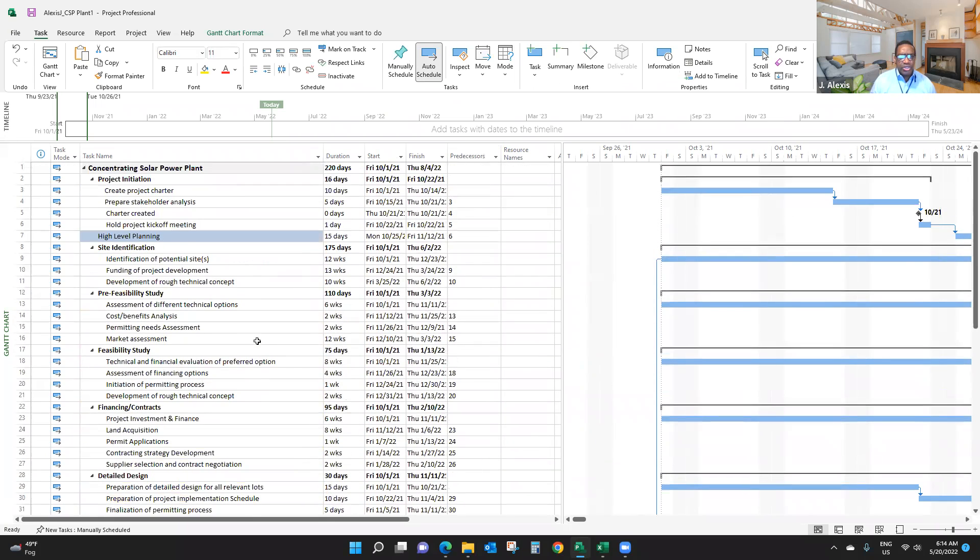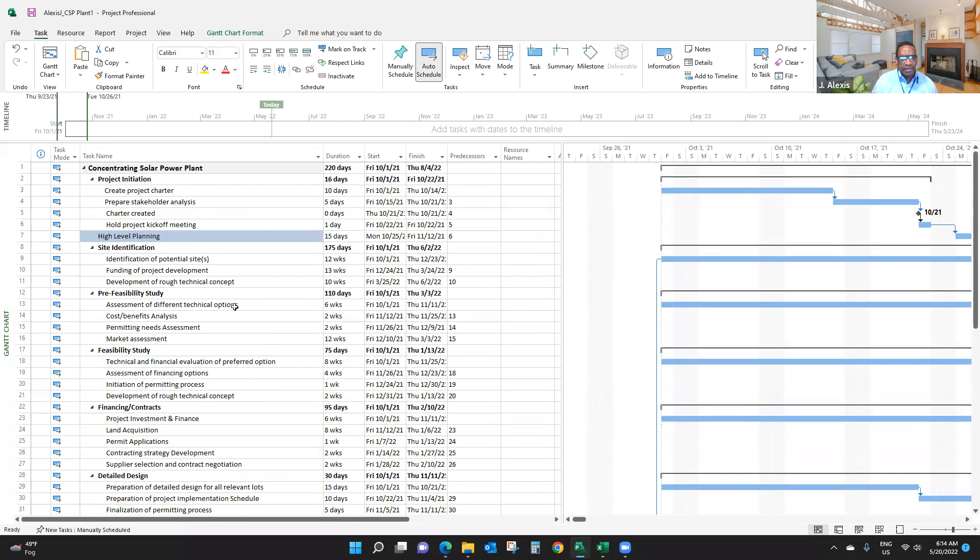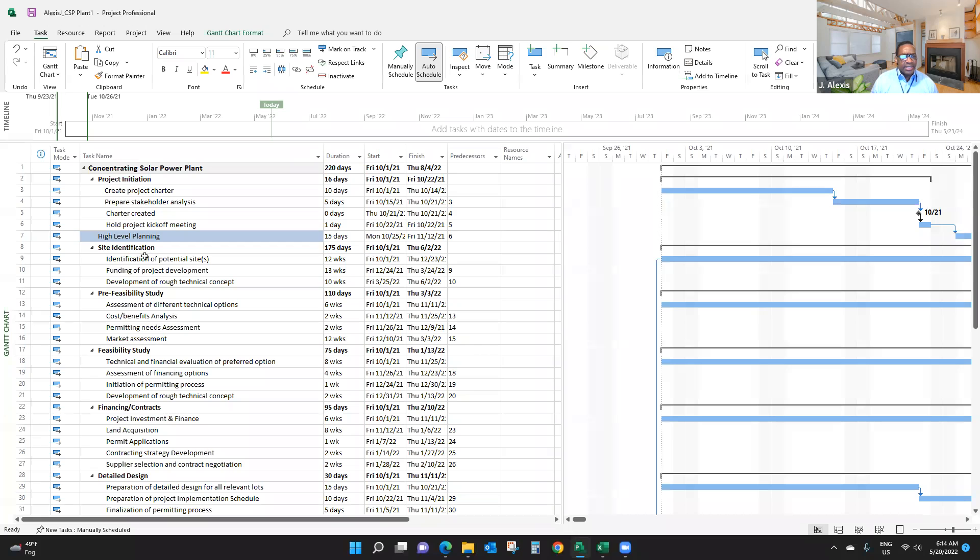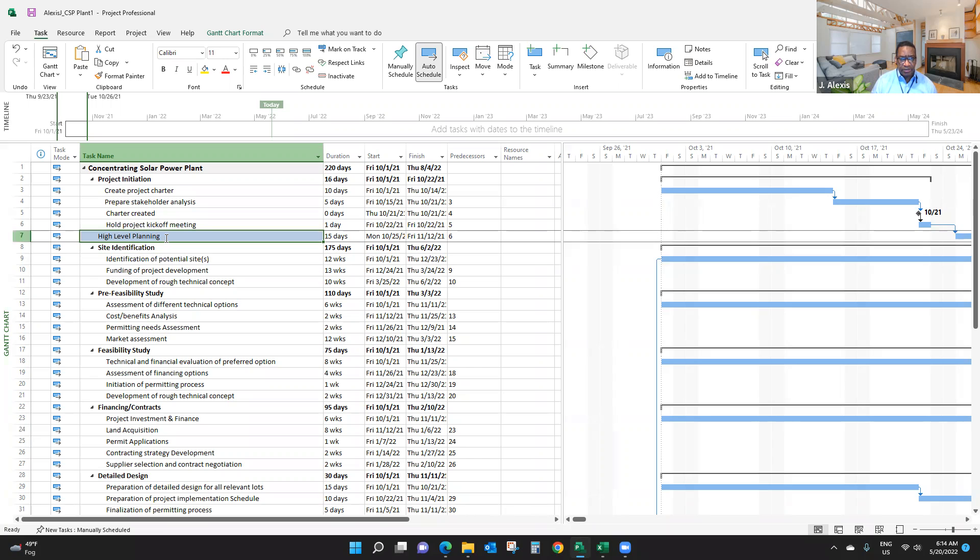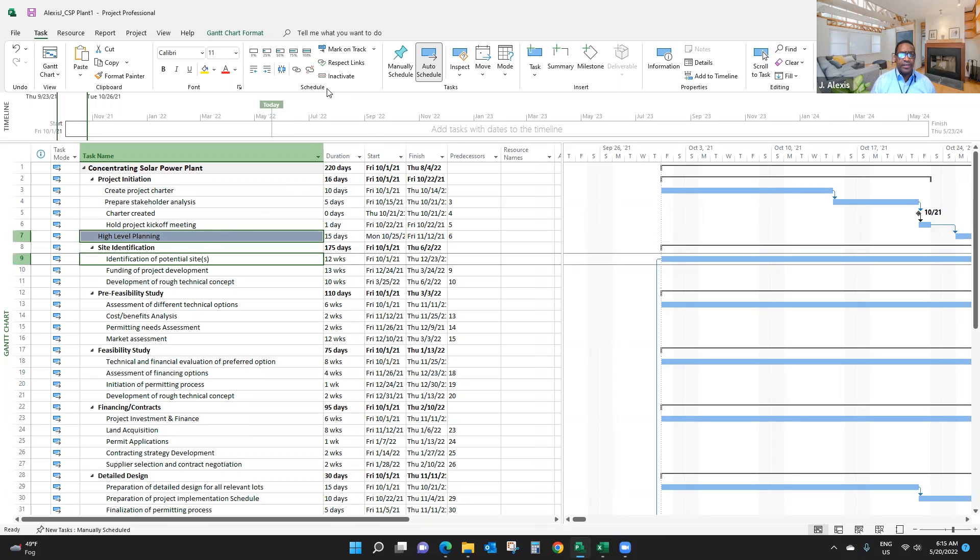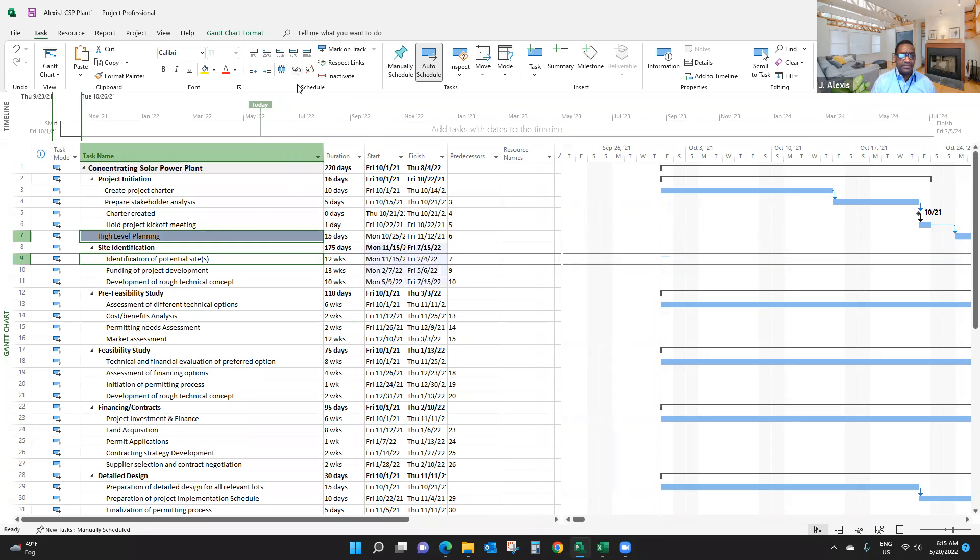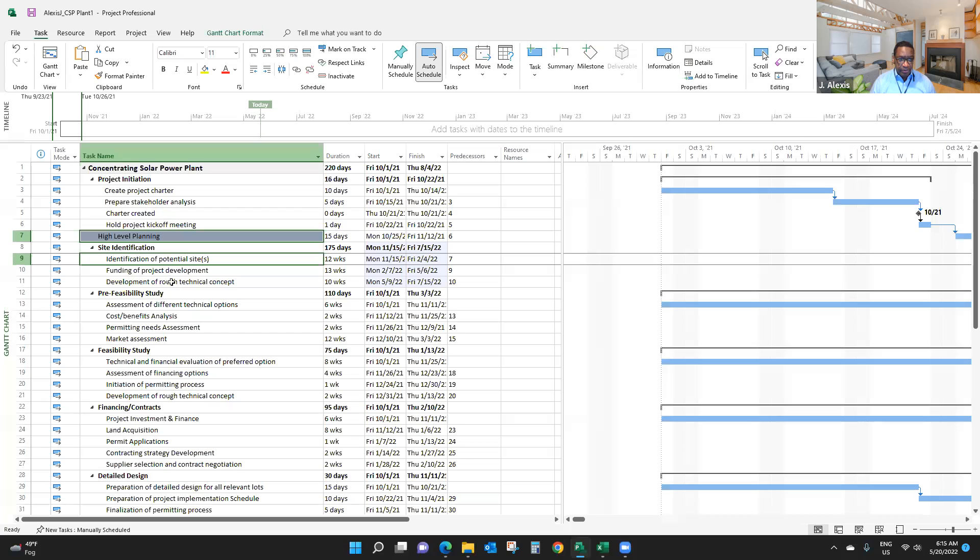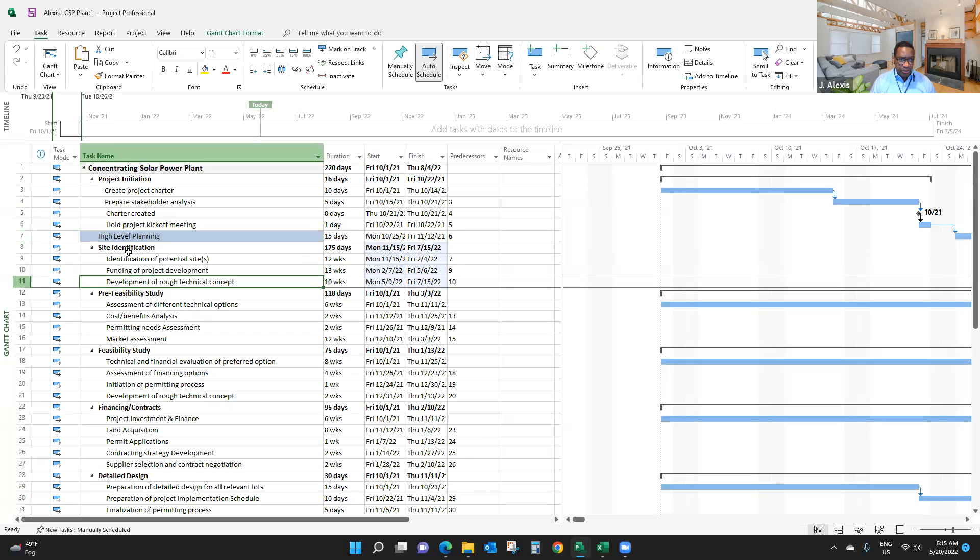Now the question you're asking yourself - how do you link identification of potential site and high-level planning? Click on high-level planning and link this. You see here, I don't link the summary item, I link the sub-item. Because this sub-item is linked to a predecessor, this one is also linked to the predecessor. What if I want to link site identification and pre-feasibility study? How do I do that?